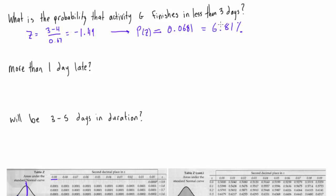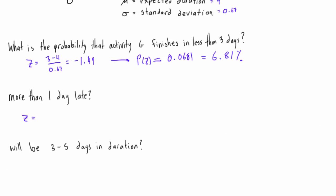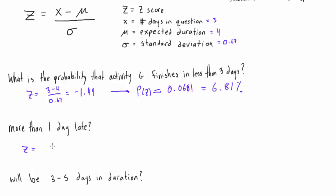Now let's look at the alternative: what if it's more than one day late? Our x won't be 1 here — 'more than one day late' means knowing our expected duration is 4, our x would actually be 5 (4 plus 1). So we have 5 minus 4 over 0.67, which gives us positive 1.49.